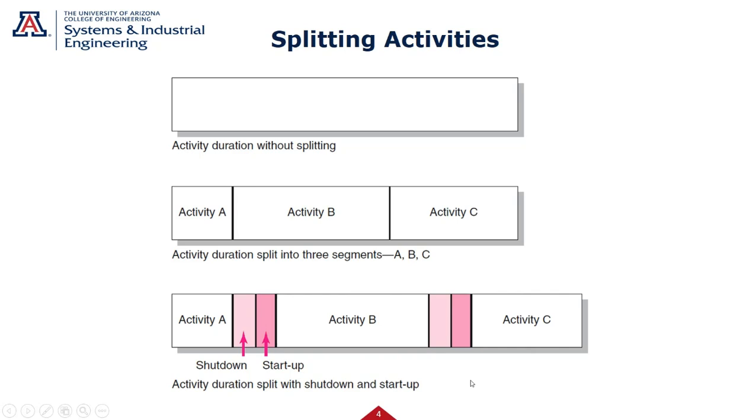Now, senior people can generally handle this better than junior people. So maybe you purposely have a senior person, and you can do that. So you have to use some judgment, but splitting activities generally isn't as efficient. Just be aware of that, but you can do that. And again, I would do it by trying to break that into several different tasks and doing those in the schedule. I think it makes it easier.